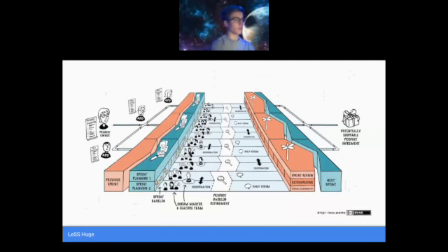Moving on. So let's say this LeSS works great if you have Scrum teams of 2 to 8 people, which is around 50 people. If you have anything more than 50 people, up to say many thousands of people, we get something called LeSS Huge, which is essentially when companies just go even bigger. And in essence, it's just many LeSS frameworks piled on top of one another.